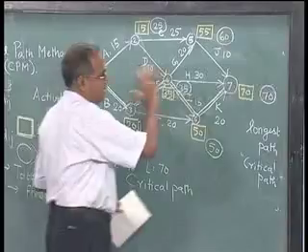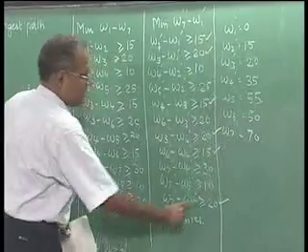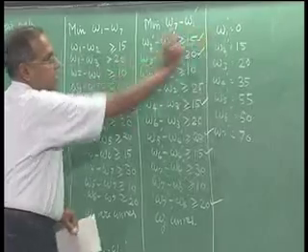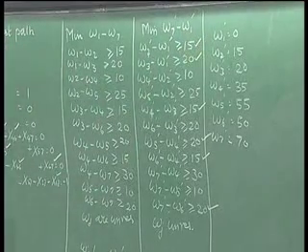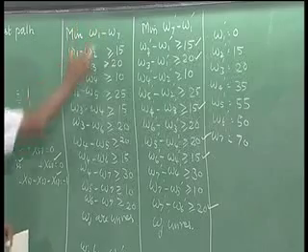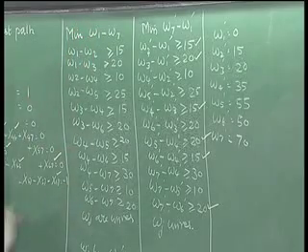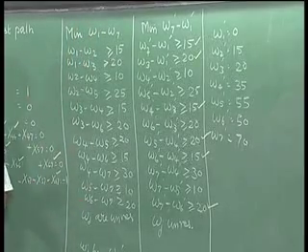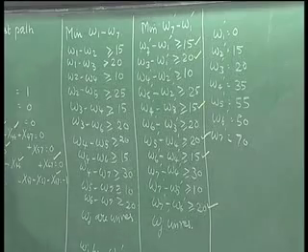So wherever we write the primal and the dual, and when we make this change, we can start with W1 equal to 0, and we will get the forward pass labels. On the other hand, if we used this and if we started with W7 equal to 0 or 70 as the case may be,